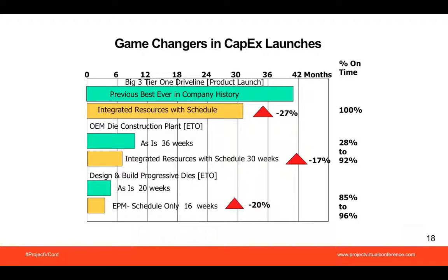The capacity forecast was not available to this company because they required a project scheduling system for one large project, as described here, to be put together. And so we didn't have capacity of all the smaller projects because we didn't want to take as much time as it would take to do all the projects. So at the end of every month, there was a forecast of all the different departments and how much effort it was going to take. And every department manager, from product engineering to manufacturing engineering to the plant, had to state how much of this project effort in man hours could not be done by their resources in their area of responsibility. And then it was up to upper management to prioritize that in a meaningful way to keep the project on track.